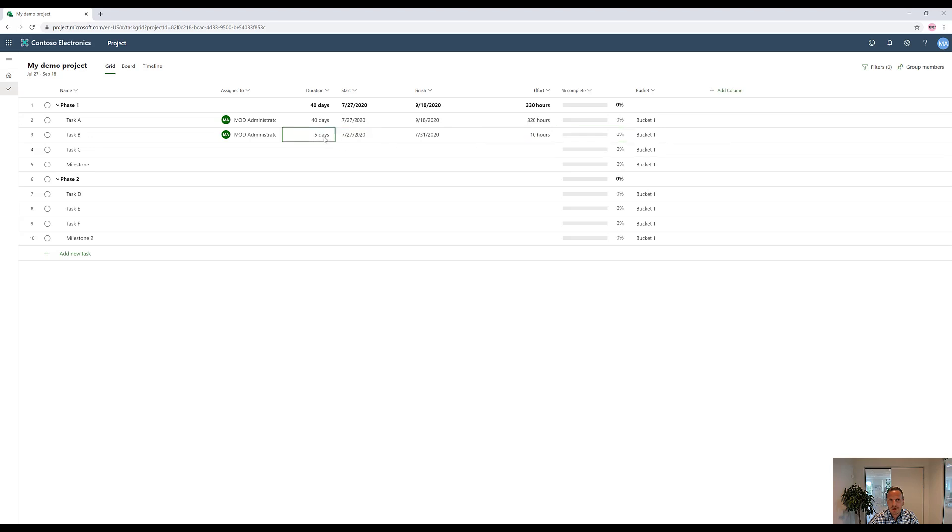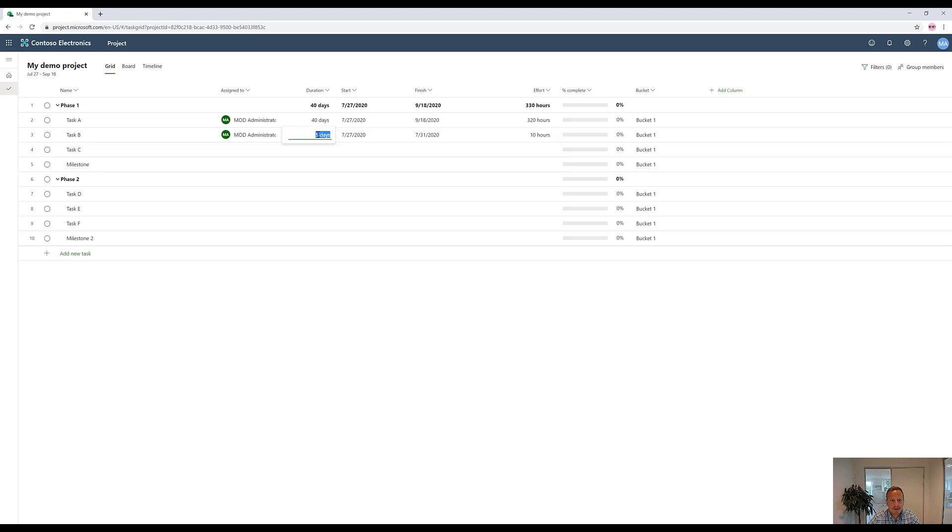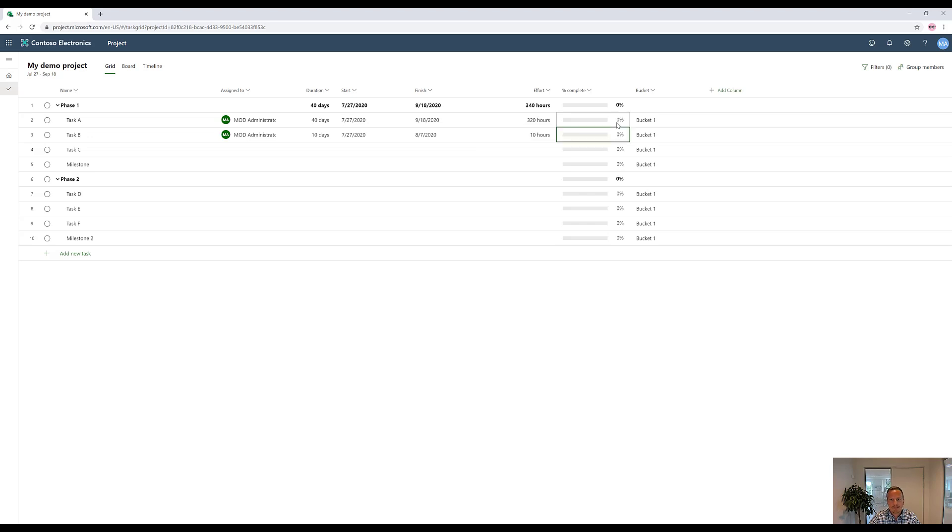If I write 10 days, then what? What has been taking place in behind the scenes is that now it has calculated that over five days, you do 10 hours of work, which means two hours each day. So if I write 10 days right now, it will suggest that now effort should be 20 hours. That's why we can now work this way, where we can have the system semi-suggest to us how much effort should be spent, but we can override it if we want to, just by going in and writing 10 hours again.